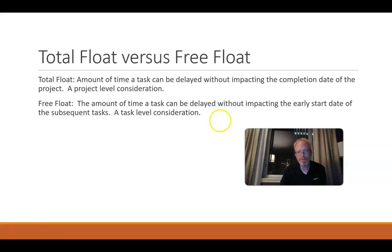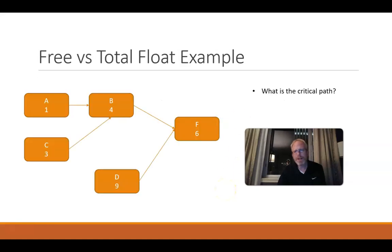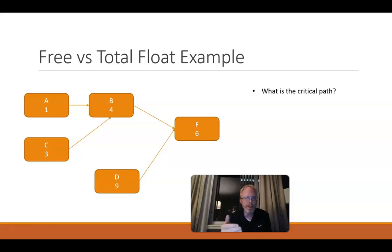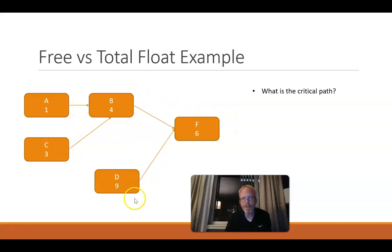It's easiest to look at this through an example. Take a look at this project we have here. First, we want to compute the critical path. F is going to be on the critical path because there's nothing parallel to it — that's our end activity. The preceding activities on F: the longest one is the DF lane at a total of 15 days, where ABF is 11 days and CBF is 13 days. So the critical path is the DF path.